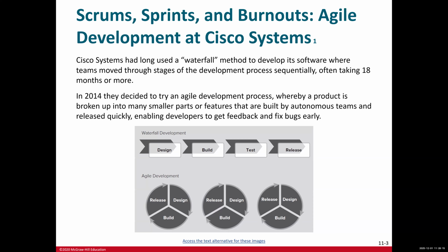Another drawback of this methodology is that because everything was planned out upfront and done in sequence, it was very difficult to make adjustments based on any type of feedback during development. So the product might be outdated by the time it is released.